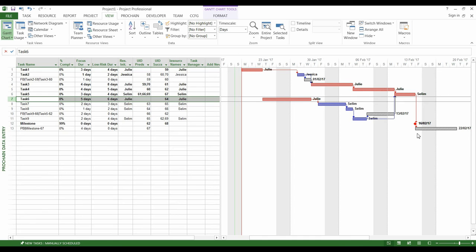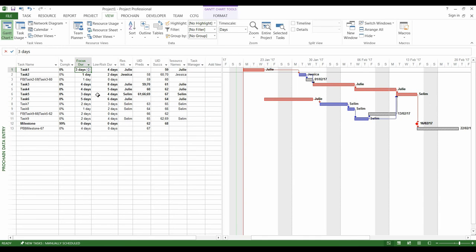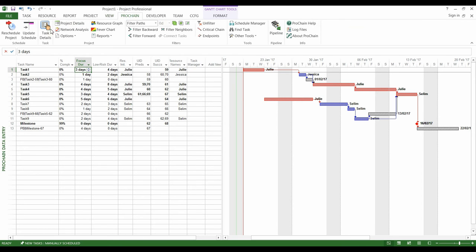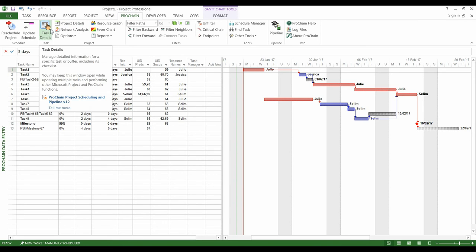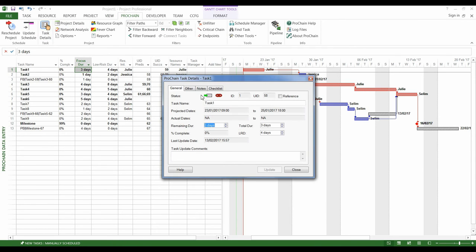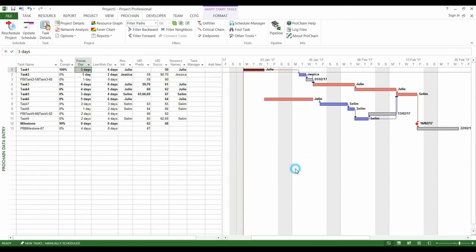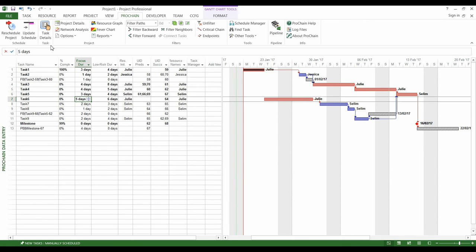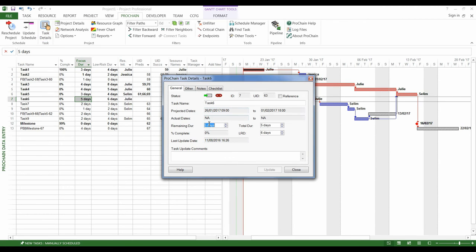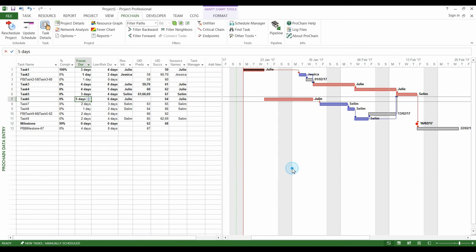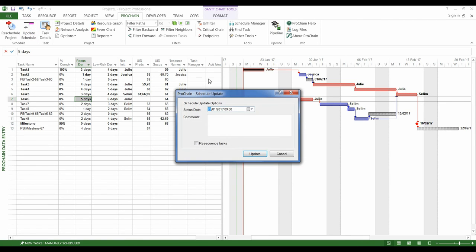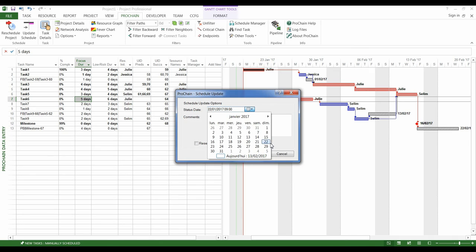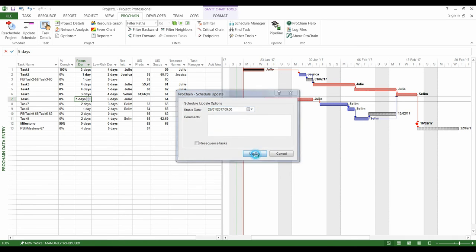When you update a Critical Chain project, the remaining durations must be reassessed. So, since task number 1 is finished, its remaining duration decreases from 3 days to 0 days. However, as task number 6 is not started, its remaining duration is still 5 days. Then, we update the project as if a week had passed.